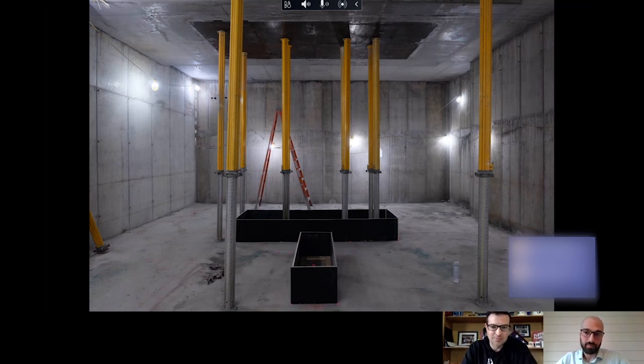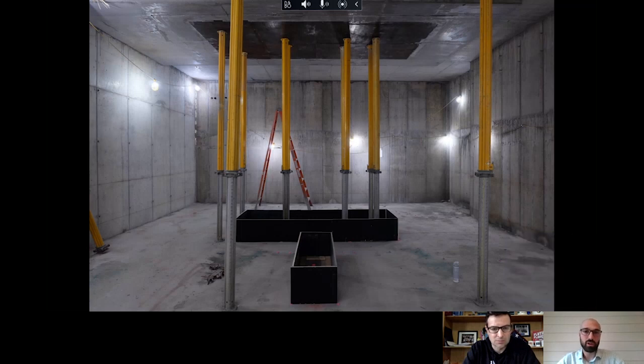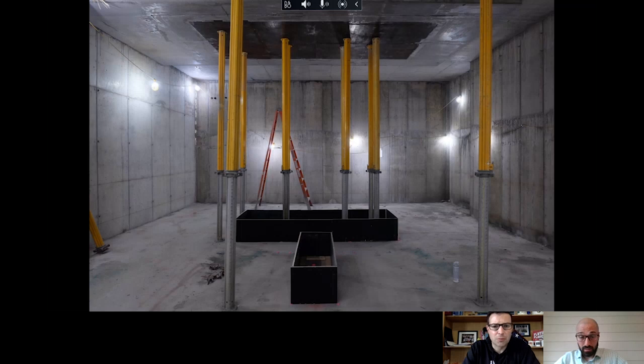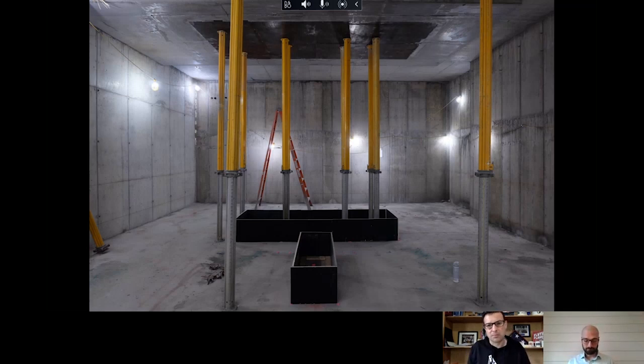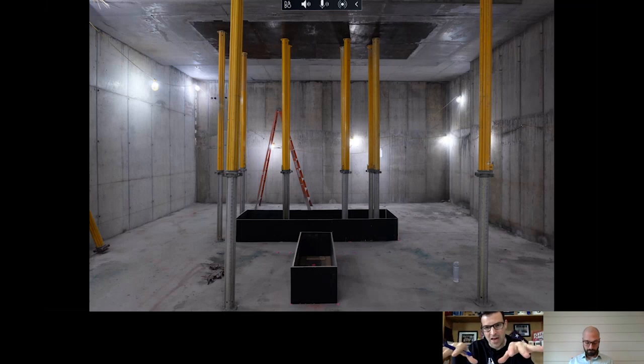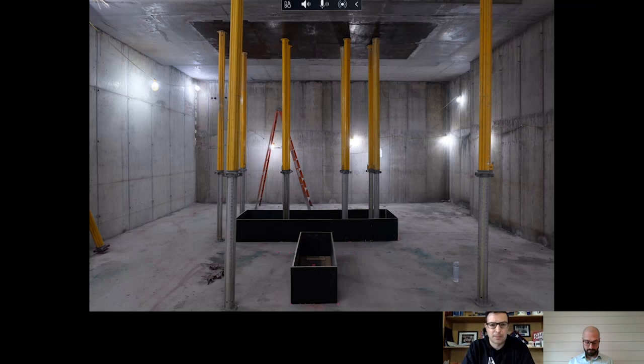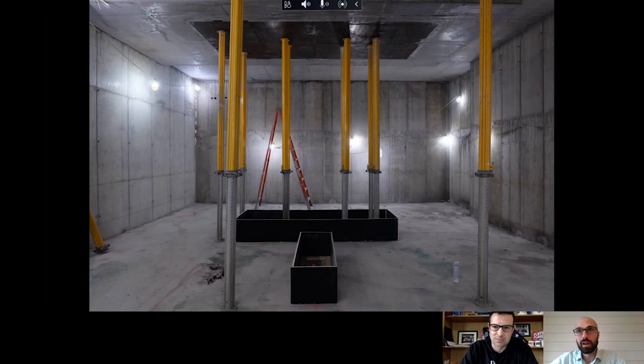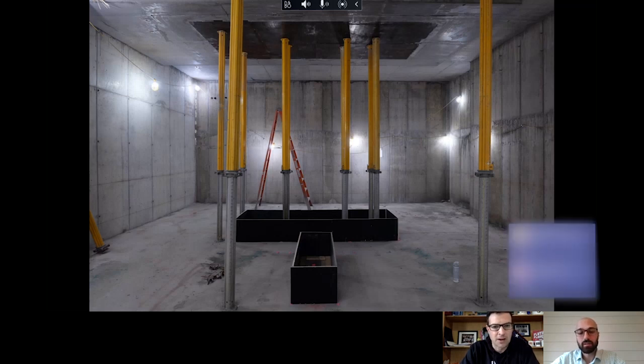So this is the vault after we stripped all the form work. You can see the steel plate that was holding the lead over the primary beam in place. We have some periforms just letting this cure up to 28 days. So now for people, especially because we have some younger folks, the more seasoned people are going to understand this. But so when you're talking about that form pushing up on the rebar is because if you had that rebar hanging off of the ceiling above and you put a million pounds of weight on that, there'd be so much weight on that upper floor. It would have been, you probably would have had some failure issues, right? Were you at the, presumably you were at the bottom floor? Our slab was on top of the building's four foot thick mat slab. So that million pounds transferred to the mat slab? Directly to the mat slab, yeah. Piles or whatever.